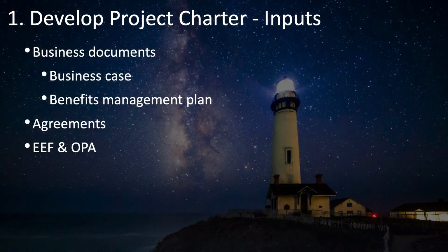Knowing what you know about the project charter, its contents, where it comes from, and how it's used, can you guess what the inputs would be for the develop project charter process? They start with some business documents. PMBOK guide specifically lists the business case and the benefits management plan.